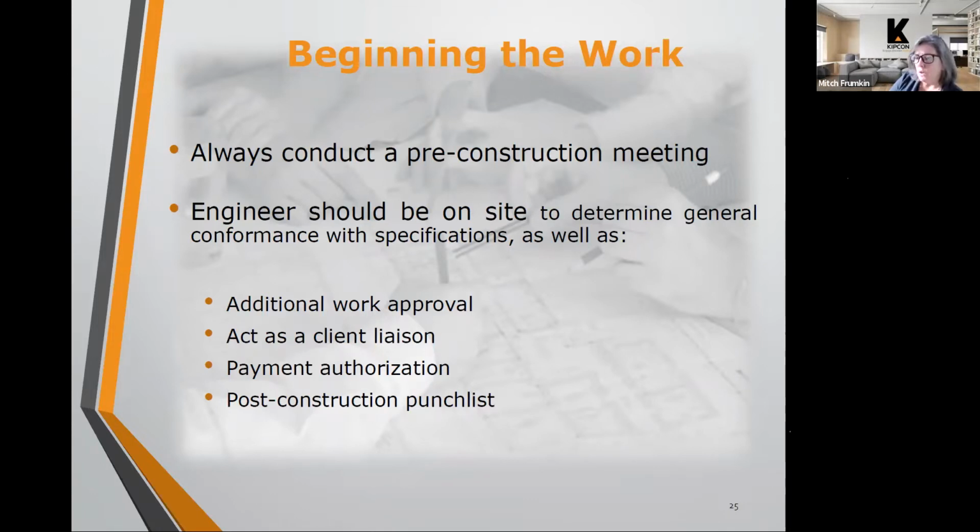The invoices are compared back to the base bid, and we recommend or make authorization for payment. When the project is completed, we'll do a walkthrough again with the same players: association, contractor, engineer. If there are any outstanding items that need to be addressed before the final retainage is released, we'll make a punch list of those items.